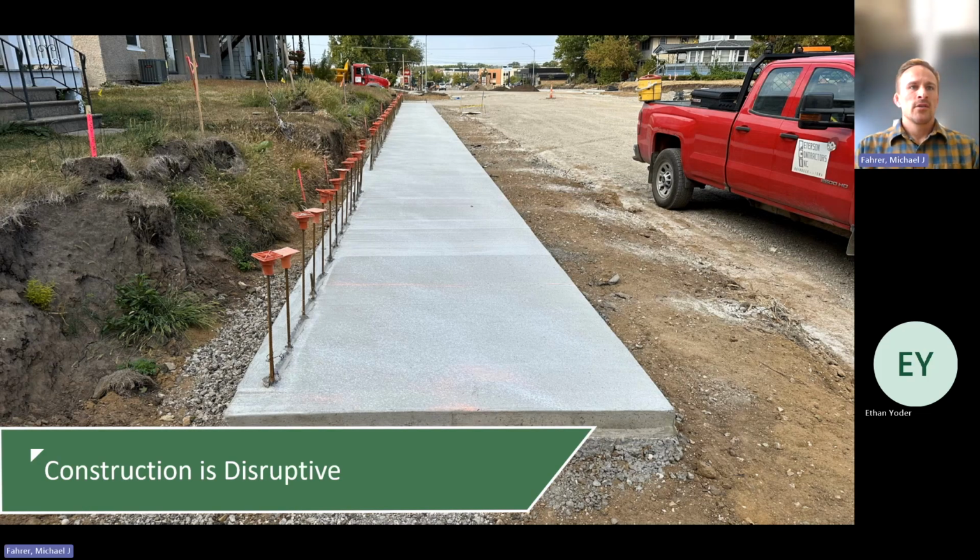This image here just gives everyone an idea of generally what the sidewalks will look like where there are retaining walls. So this is the first phase of pouring that combined concrete sidewalk and retaining wall. As you can see, the flat surface there is the walkable sidewalk, and those vertical rebar sticking out of the concrete are where the vertical portion of the retaining wall will get poured.